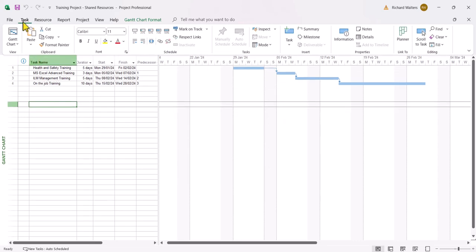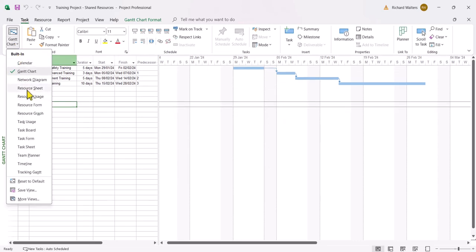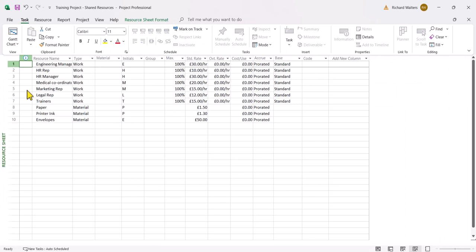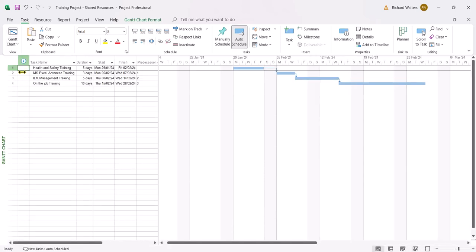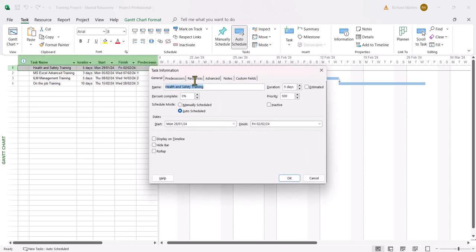And now if I go check the resource sheet view, I now have resources where this would have been blank before. I'm going to go back to Gantt chart. Again I'm going to assign Trainers to this particular task, and again it's starting the 29th of the 1st, 2024 — so it's a conflict in dates if they share the same resource.